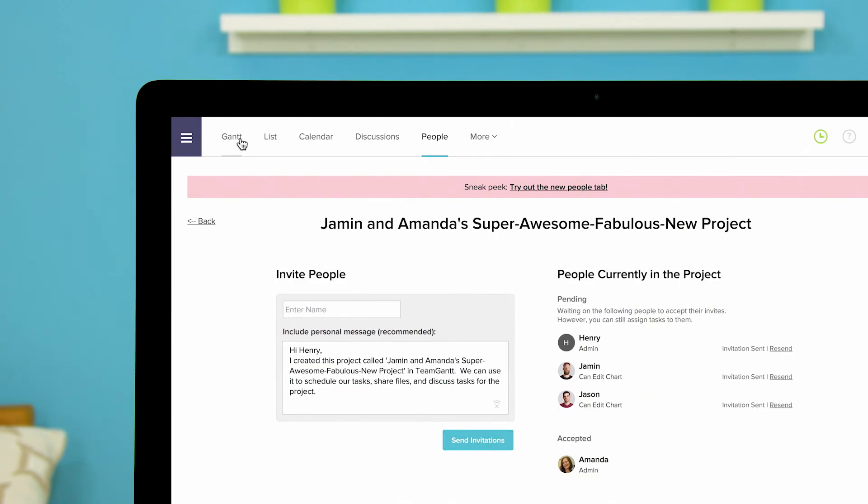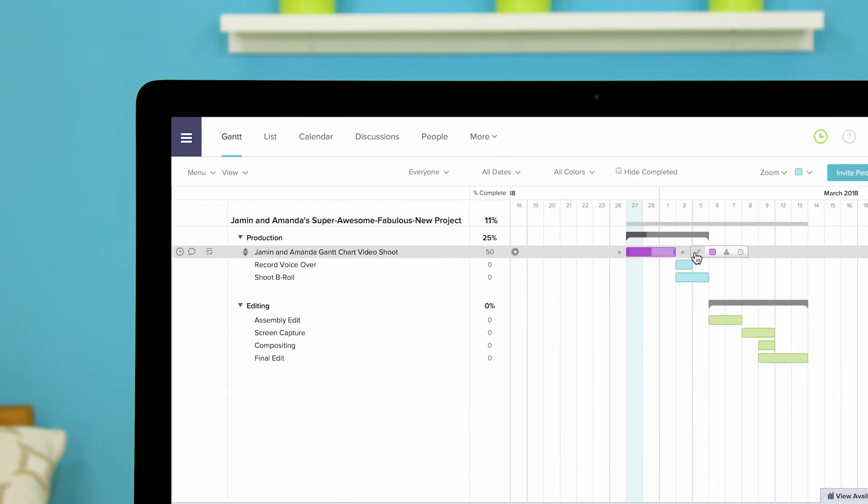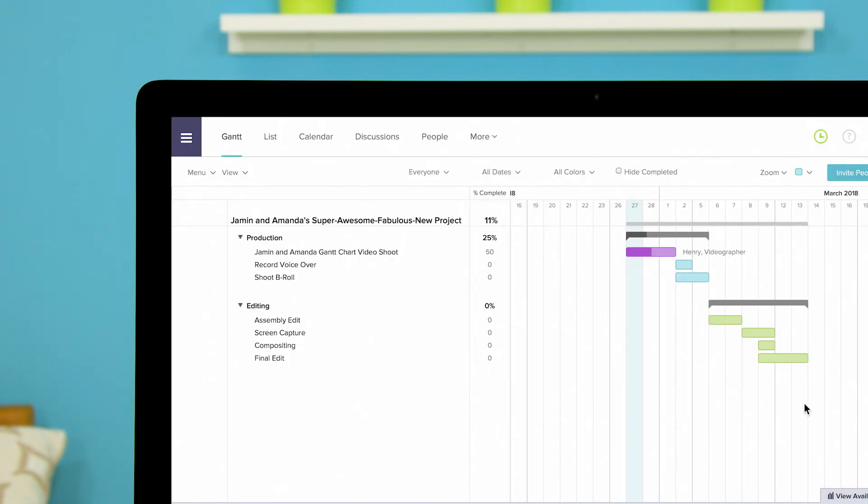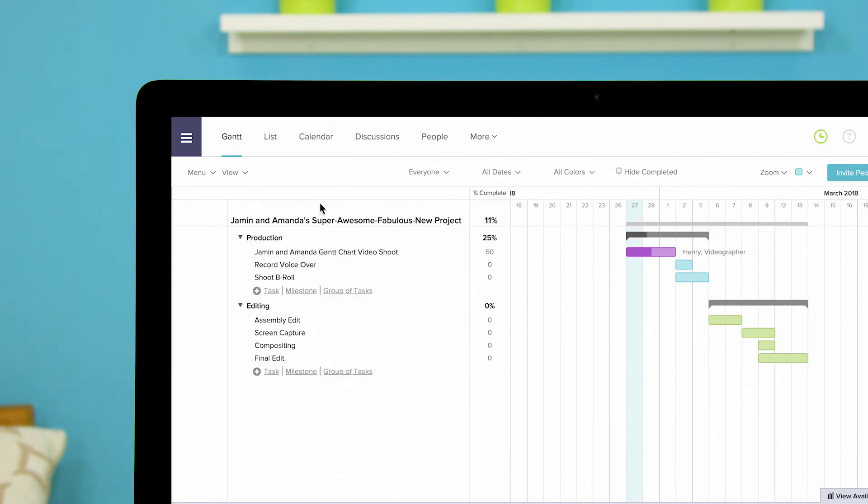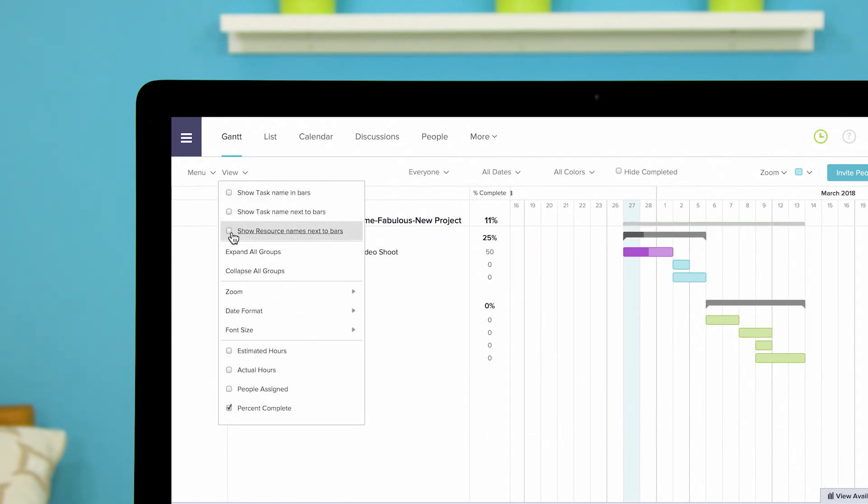Click the Gantt tab to go back to your Gantt chart and now when you select the person icon the person you added will appear. Now select the people and resources you want to add to the task and click done. You can see the person and resource names added to the task to the right of the task bar. This can be toggled on and off from the view drop-down.